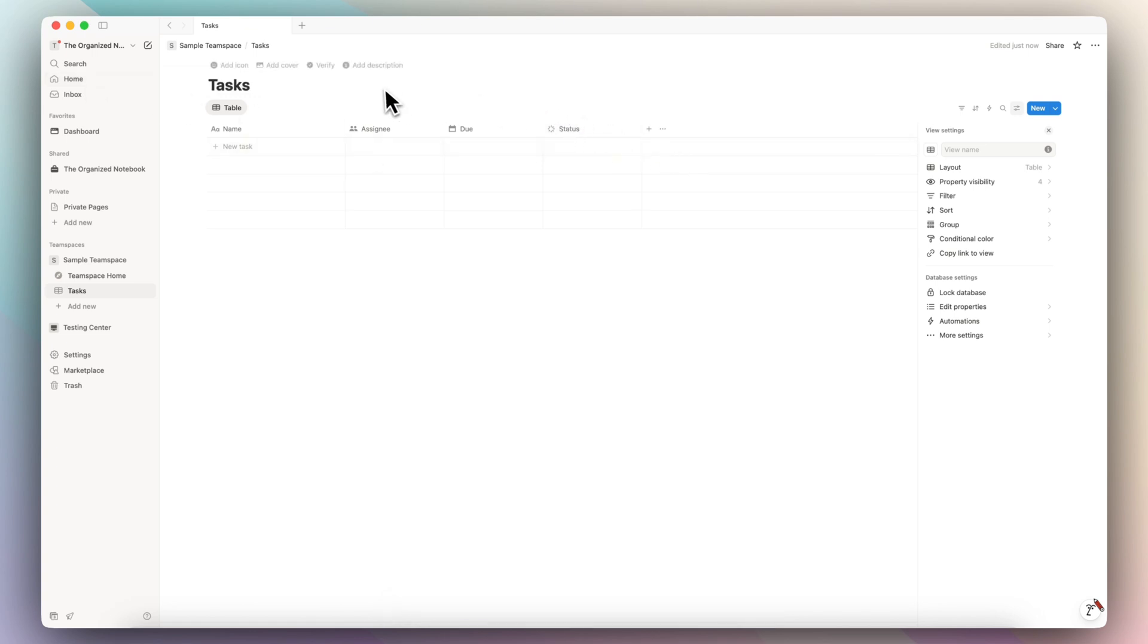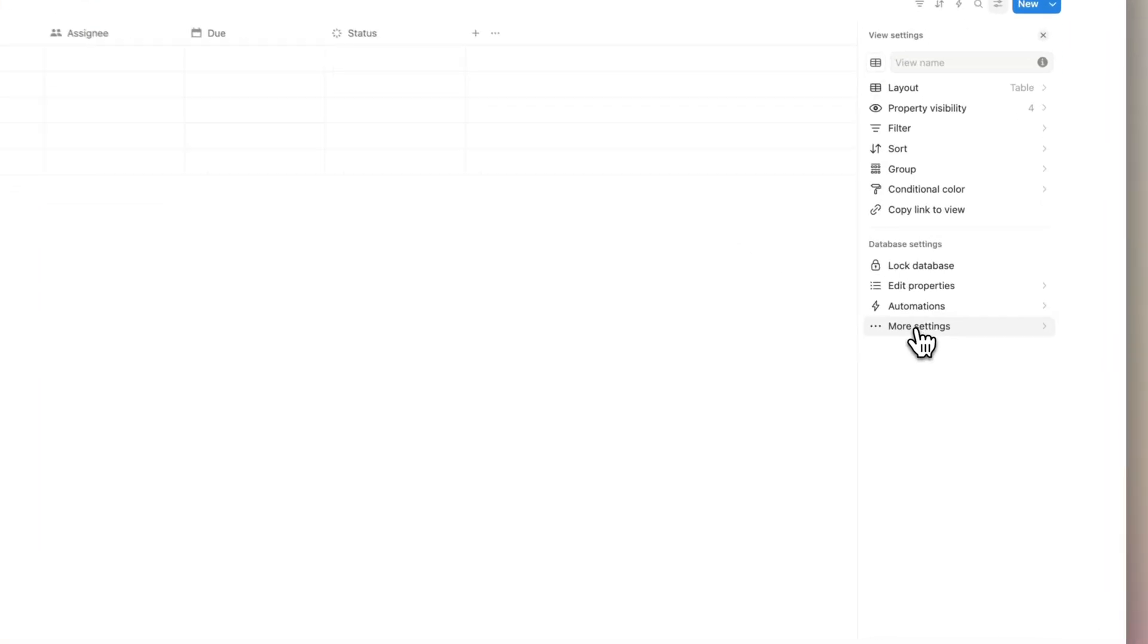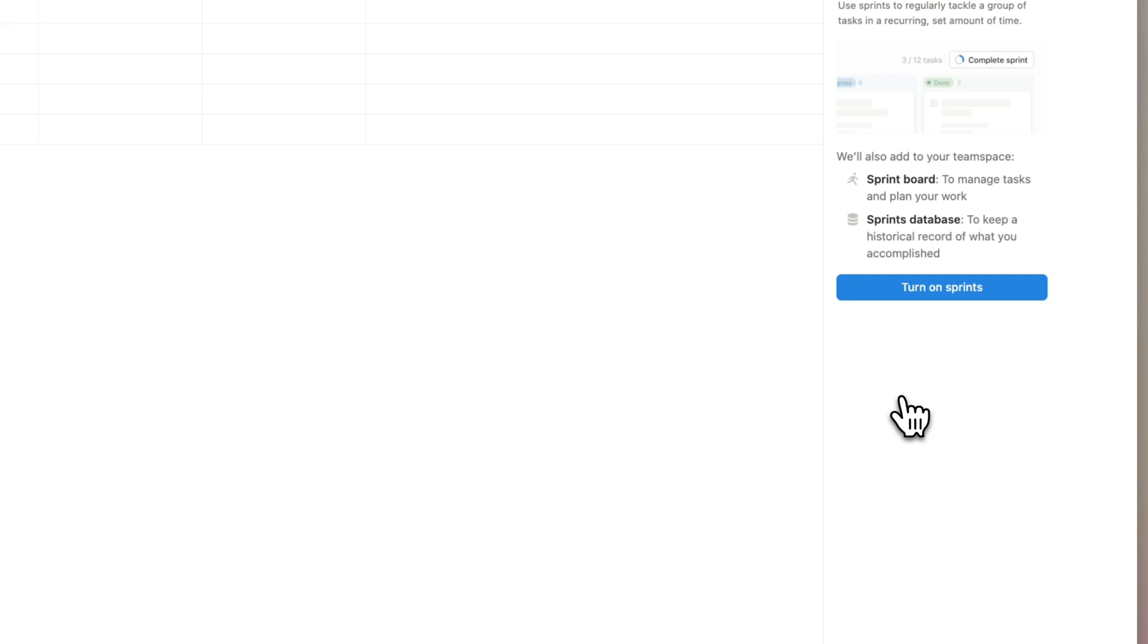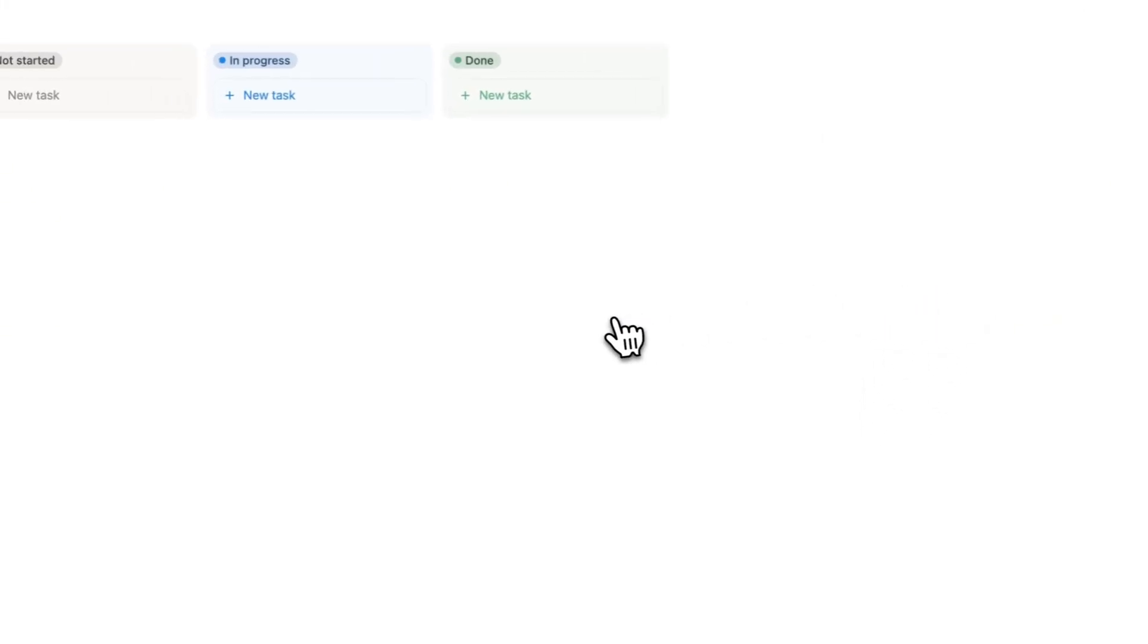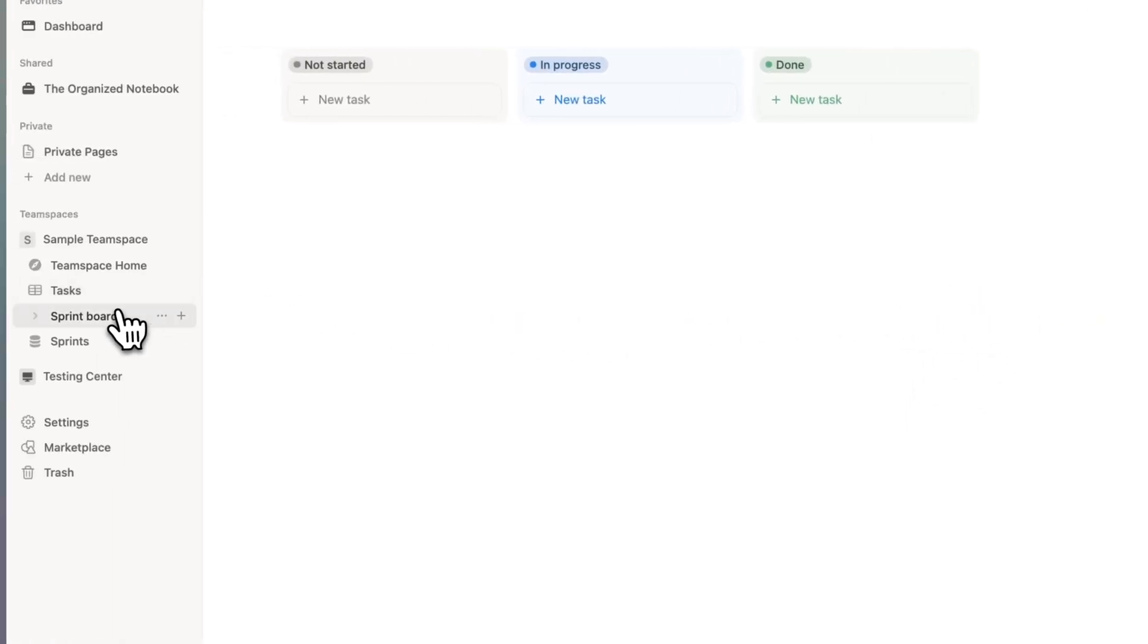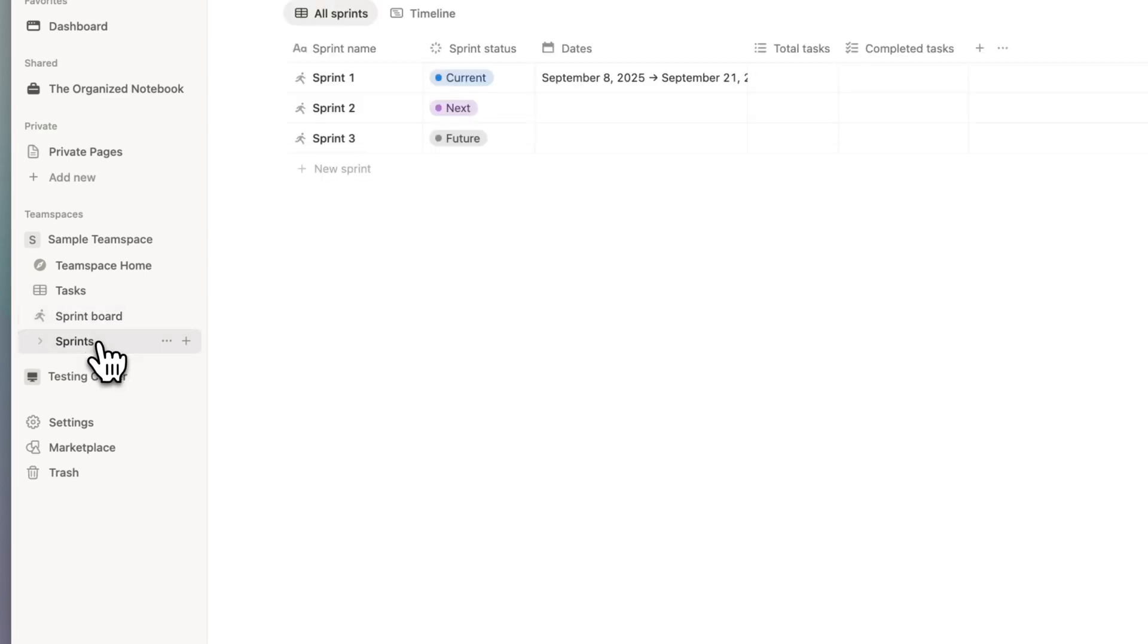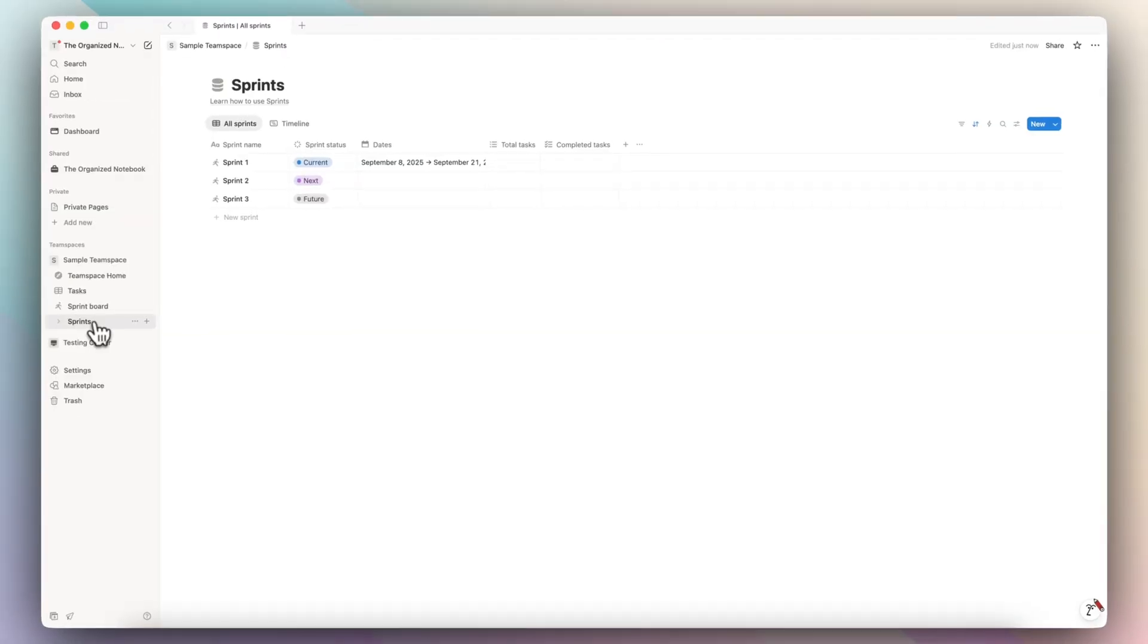Now that we have a task type database, the next step is going to be to go to more settings, then click sprints, and then we can click turn on sprints. It's going to create a sprint board as well as a sprints page. These two pages don't really act like a traditional Notion database or page because they have built-in features in order for sprints to work.